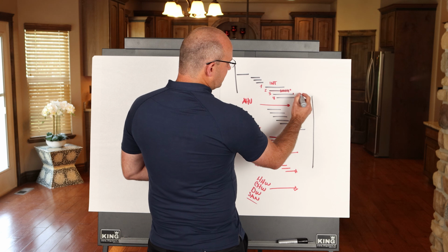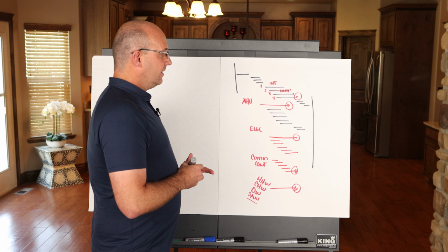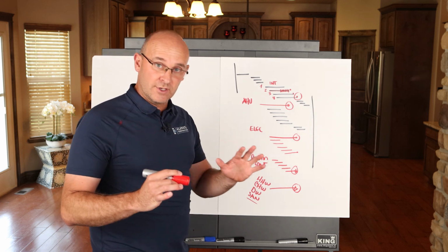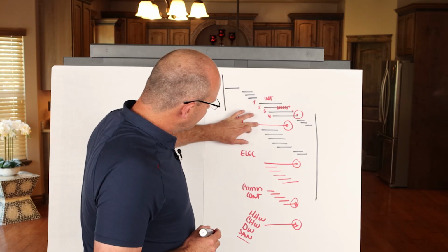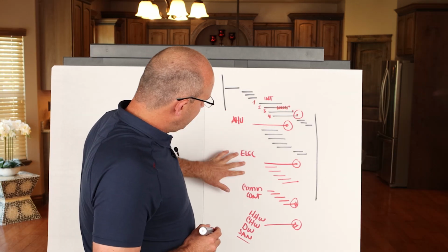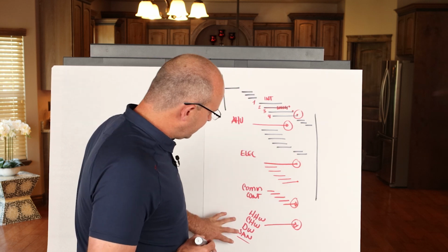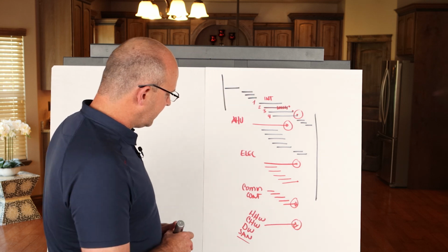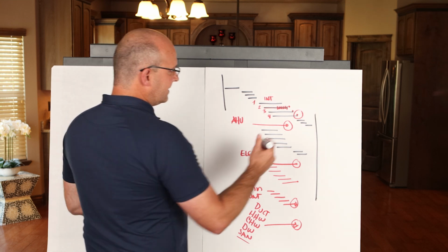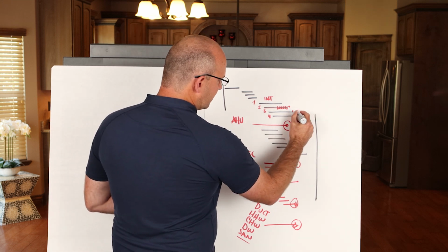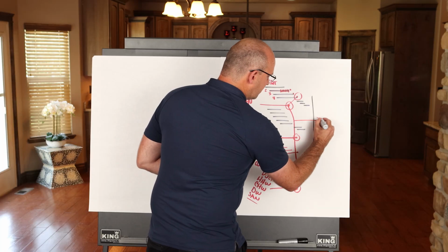So all of these, this milestone, milestone, milestone, milestone, milestone, and this is the bare minimum. There's more to it. I'm just showing you how to approach it. So the individual commissioning activities by floor, the setting of the HVAC system, the electrical running up through the building, the internet and controls running up through the building, your hydronic piping, and obviously your duct. I'll go ahead and add duct up here. All should come together, and this is the release. All of these release together, I'll just draw it like that, for us to start doing a couple of things.